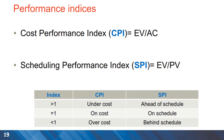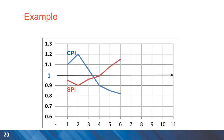Other performance metrics can be generated by taking the ratio of earned value to actual cost — the cost performance index (CPI) — and the ratio of earned value to planned value — the schedule performance index (SPI). The objective is to avoid these indices falling below 1, as that indicates the project is over cost or running behind schedule. You can plot CPI and SPI to visualize the project situation, with the benchmark being 1, so being above that line is desirable.